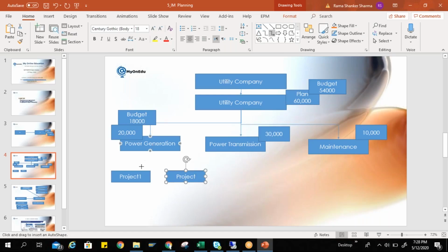Because my overall budget is available in the last position, and we need to distribute that budget to this project. So we have two ways. If it is through an appropriation request, it will automatically be here, and the budget will be passed from the appropriation request to your PS project. Let's keep it simple, because sometimes it's confusing.